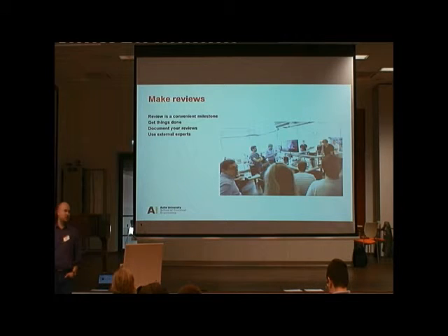So reviews are really important. Most student projects at least are sort of deadline driven. If you have a deadline, things happen. If you don't have deadlines, things are not happening. So a review is a really handy deadline. It has a real meaning. You have to get things ready, and when it's done, you get feedback from independent experts.